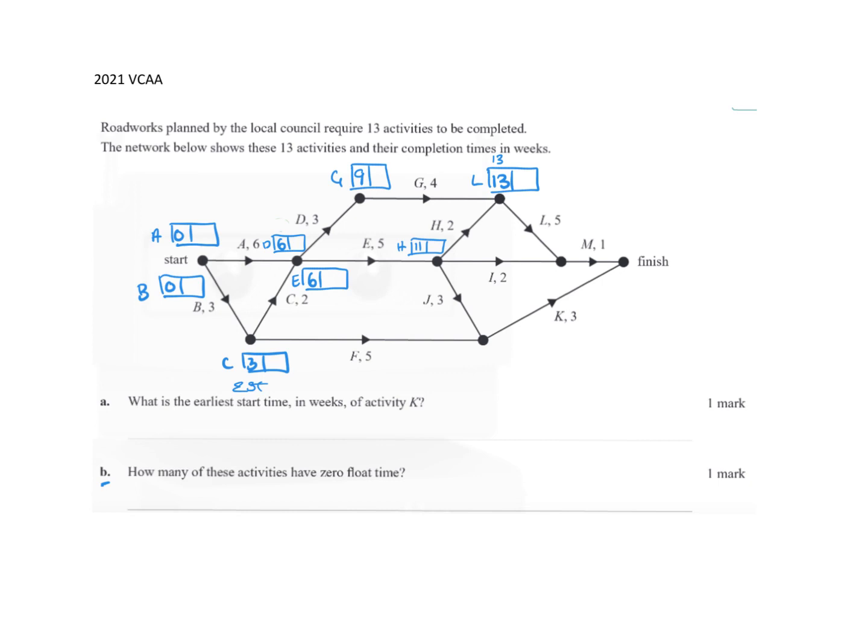All right, so then I might keep continuing along the bottom. So the C, 3 plus 5, well, this is going to be for K. Now I'm just going to put 8 there because I can see J comes along here. So from H going like that, I could put J here, it would also be 11. So 11 plus the 3 would be 14. So this one's actually going to be 14 there. And so I'll rub that out.